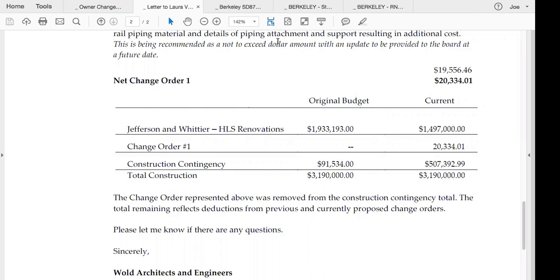This and the entirety of furniture, fixtures, and equipment budget is also tracking very well. You saw a little bit of that on the furniture side, but we also have the playground equipment bundled in this budget, and obviously the contingency. So overall, collectively, there's about $496,000 in that budget because of some of the bid results that we've been seeing over the multiple packages. Playground is right on budget. This is tracking below budget. We also saw a little bit on the furniture, and freight and delivery is another contingency that Mrs. Spence mentioned that's still hanging out there. So we're in good shape on this furniture, fixtures, and equipment budget. Any questions?